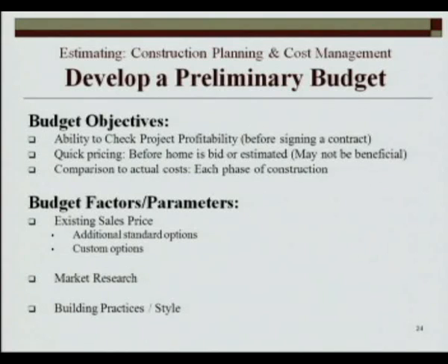Developing a preliminary budget. The budget objectives. It's the ability to check the project's profitability before signing a contract. That's what we talked about. You should have a preliminary budget so that you know what you're getting into. Quick pricing before the home is bid or estimated, and compare to the actual cost each phase of construction.